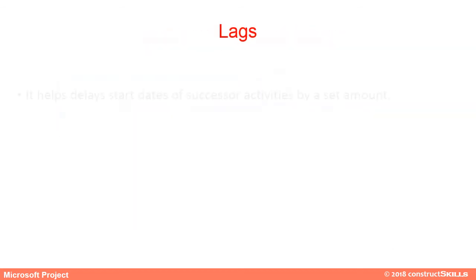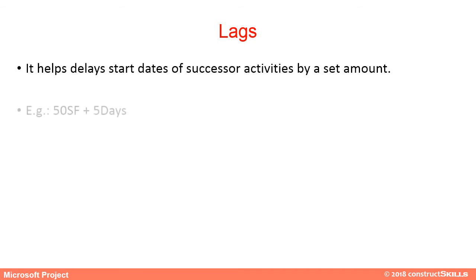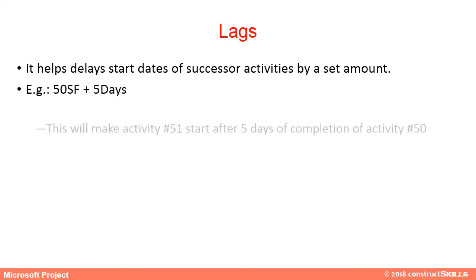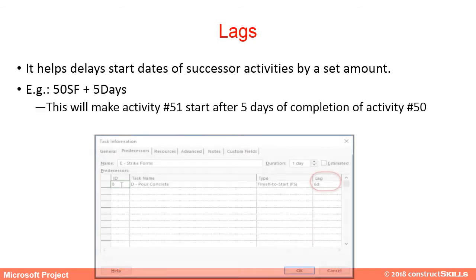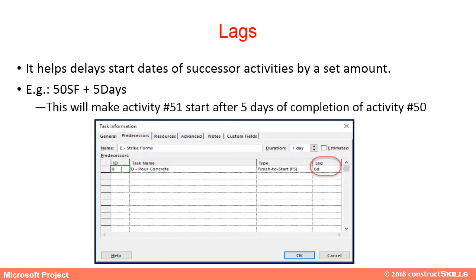Lags help separate the start dates of successor activities by a set amount. For example, the lag in a relationship will make Activity 51 start after 5 days of completion of Activity 50.